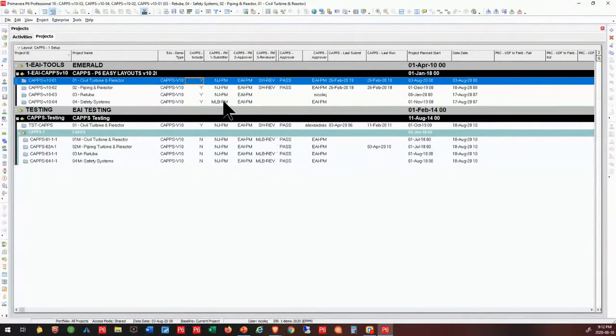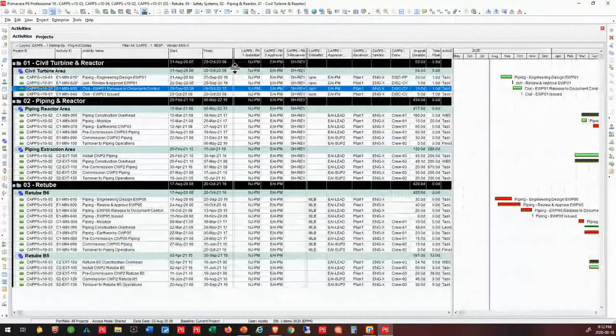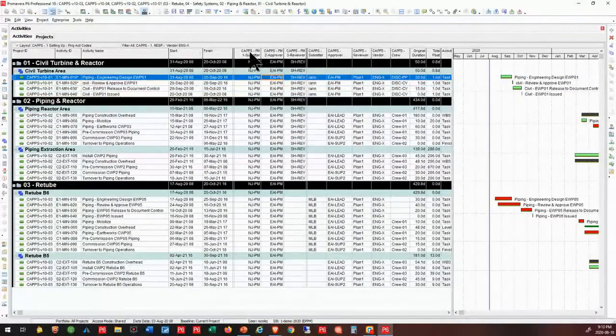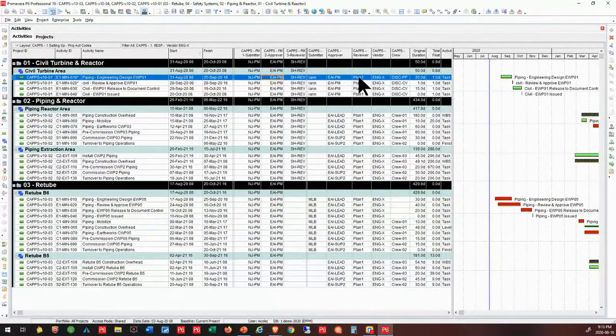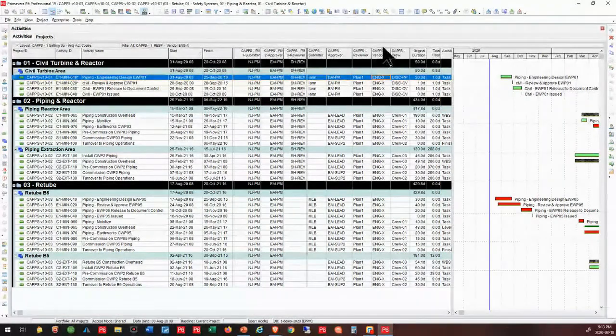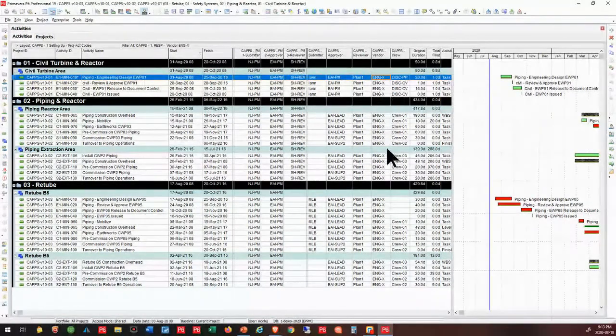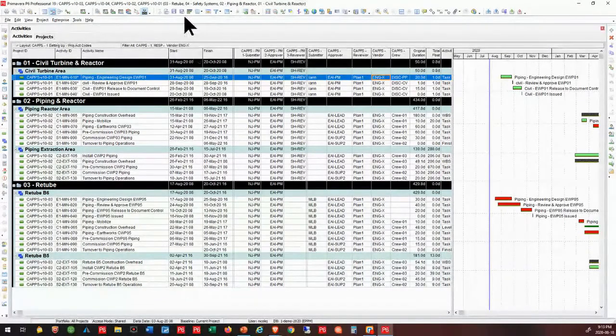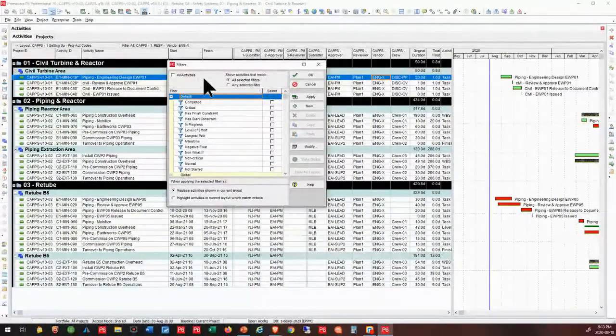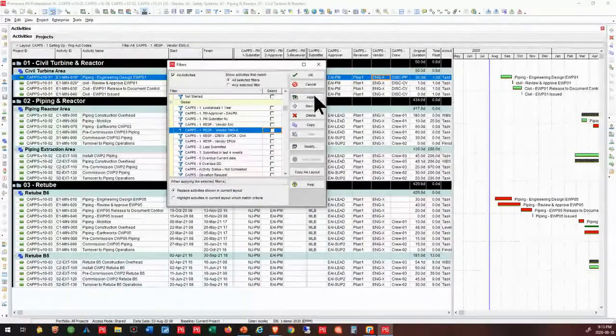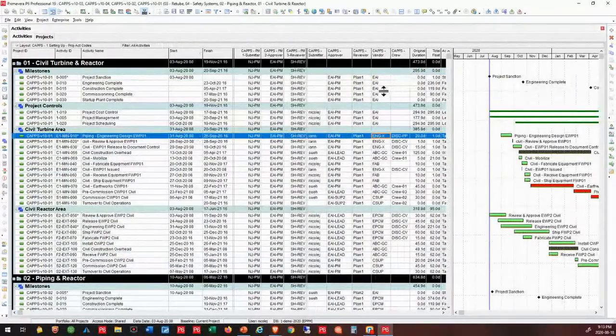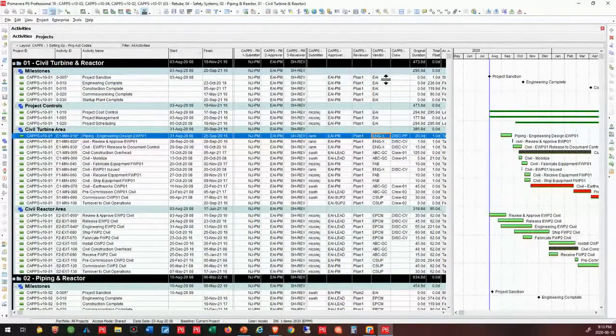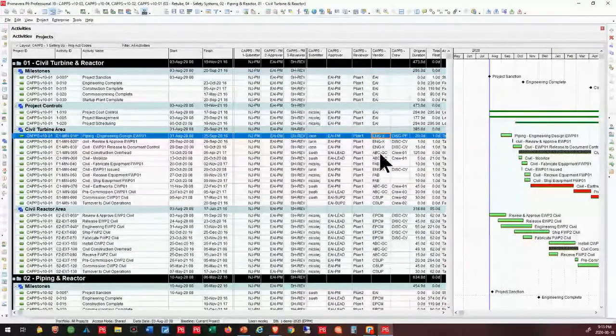But if you have a little bit more of a complicated project, you may well want to use a different level. So I've got the example here where I've got different vendors. We're going to do part of the work. Now you can see that I've got it filtered. So I can go ahead and unfilter that. And I'll take that vendor filter off. So you could just see that I can have multiple vendors. So it's a responsibility code, in essence, that I've used to identify who's going to do the work.